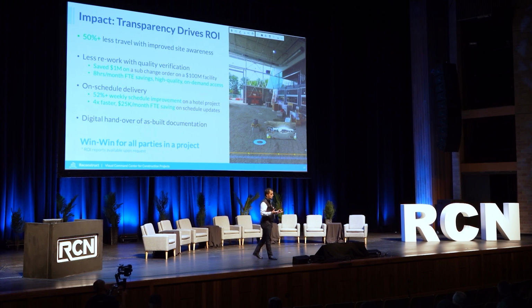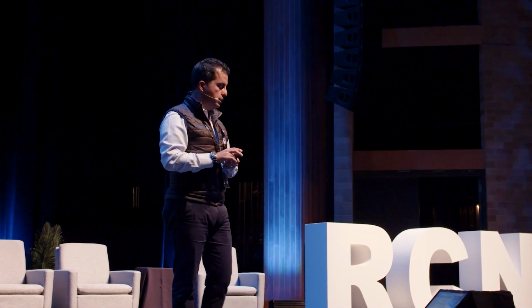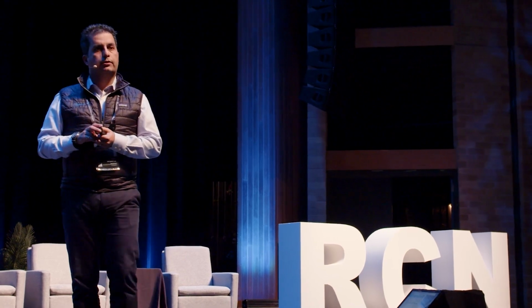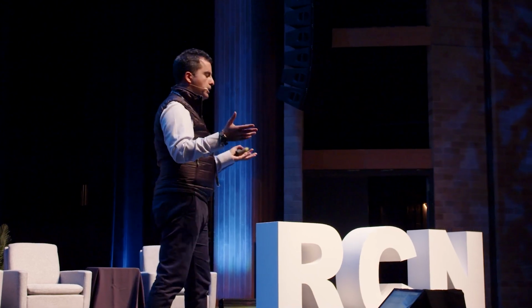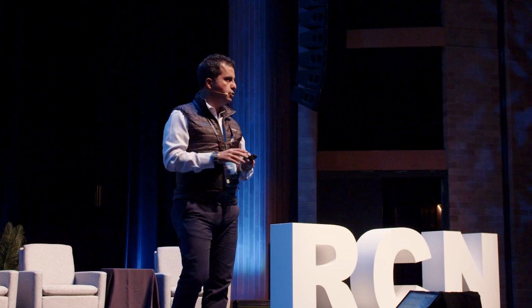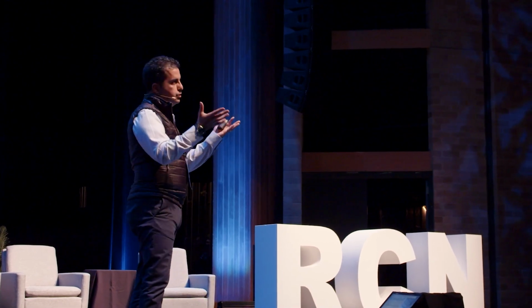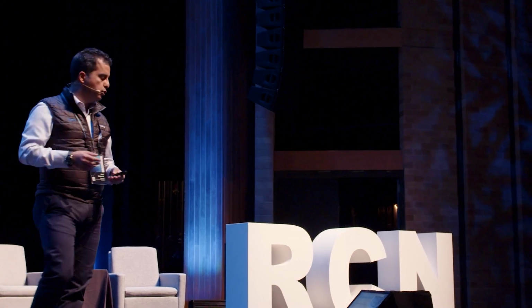So, fast forward, having that site awareness. Many of you have already practiced reality capture through COVID. It's already shown how we can take advantage of that just by bringing our stakeholders on the job site. Quality verification. This is actually something I'm really proud of. Minimizing change orders driven by subcontractors. Now, when you have transparency that you show the design, you show the reality of the job site, you can minimize this. This is with a car manufacturing company in Michigan, we're able to demonstrate $1 million saving on $100 million. When you see the design against the reality and use that as a coordination, no brainer. You can potentially save these issues from happening.